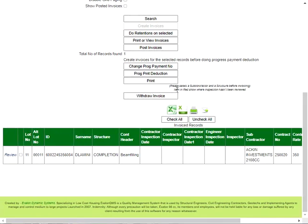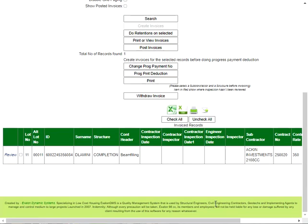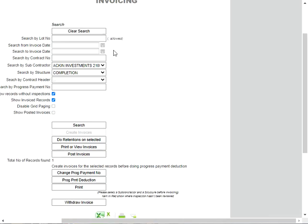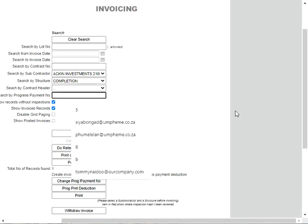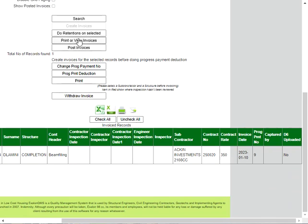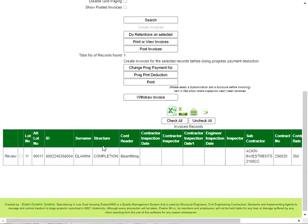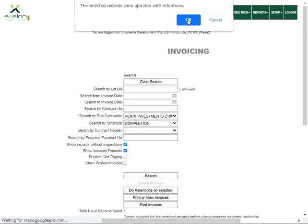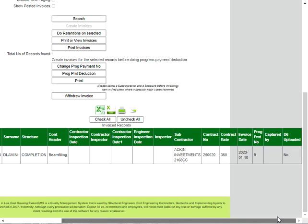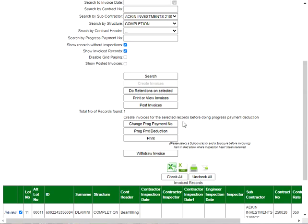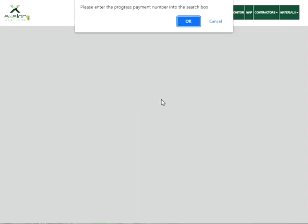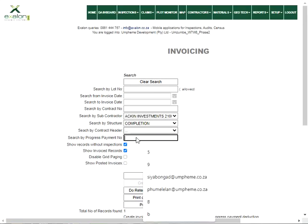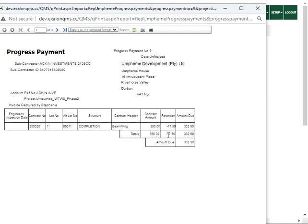Now we could view that. We could say print or view invoices. We'll see that the progress payment number is nine, so we have to enter that number. And then we can say print or view invoices, but before that we have to select it and say do retentions on selected. Now the record has been updated with retentions and it will show in the progress payment. Let's view, put the nine in there, and there it is.